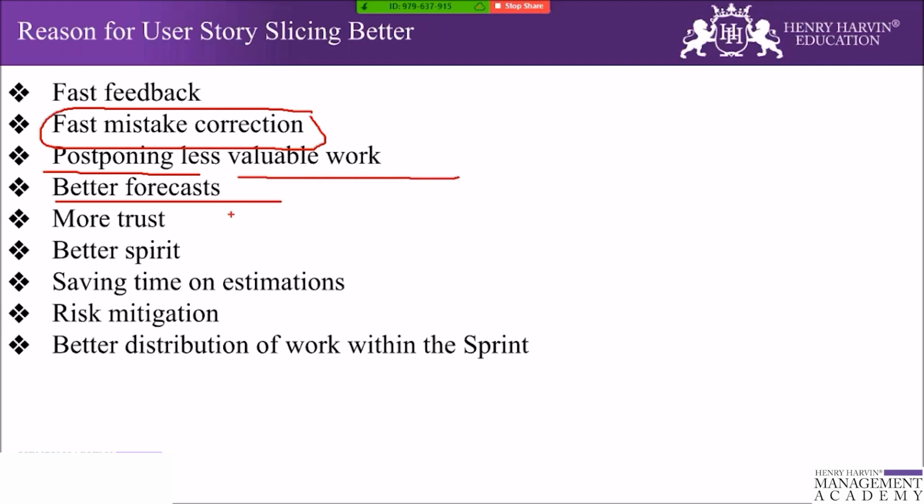If the stories are sliced into smaller ones, the possibility of achieving multiple stories at the end of the sprint is greater when we have split the stories, and the possibility is less that we will achieve multiple stories when the story size is large. So if the development team had small stories, say 3 pointers each, they are going to have at least 7 stories in the sprint.